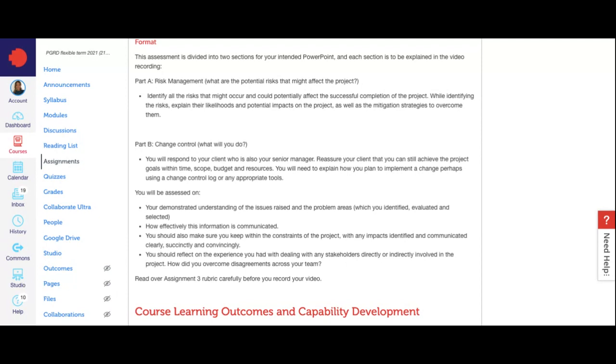Yes, Atheat? I just want to ask about the change request log. Do we put the information from the urgent news as things that need to be changed in the change request log here? Yes, everything is based on the urgent news. The urgent news starts with your risk register, because you bounce down your risk register.